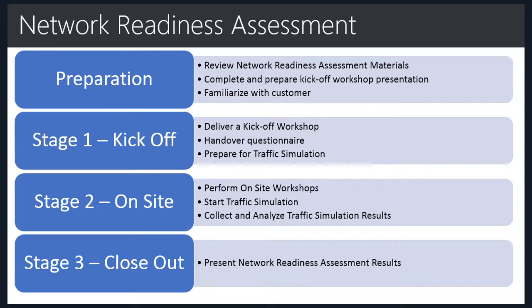Now, during stage 1, you'll deliver the kickoff workshop, you'll hand over the questionnaire, and you'll prepare for traffic simulation. During the on-site, you'll perform the on-site workshops and start the traffic simulation. Please note, however, that starting the traffic simulation doesn't necessarily mean you touching the buttons. It might certainly mean that you get the customer ready so the customer themselves can start the traffic simulation. It's something you will have to decide together with the customer who will be running the network simulation.